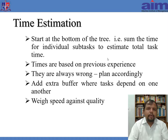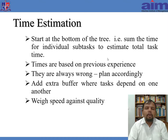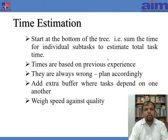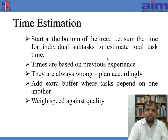Estimate the time. From the work breakdown structure with start dates and projected end dates, it is easier to understand how long the project will take. It should be realistic in nature — look at your previous experience. A contractor cannot say he'll construct a two-floor building in two months; based on experience, he might estimate seven months. Estimate the time again and again because it could always be wrong, and plan accordingly. Once you estimate the time, please add a buffer time, because each task depends on another.